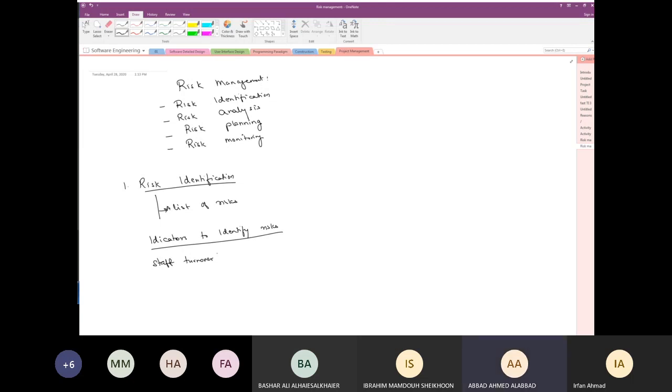Lack of interest from the workers. Yeah, so you're seeing that maybe the staff motivation and morale is down for some reason, right? So they don't seem that motivated. Maybe there are some internal issues going on. So, yeah, people are asking for a raise, so they're not satisfied. Somehow their motivation is down. So these could be indicators of risk.